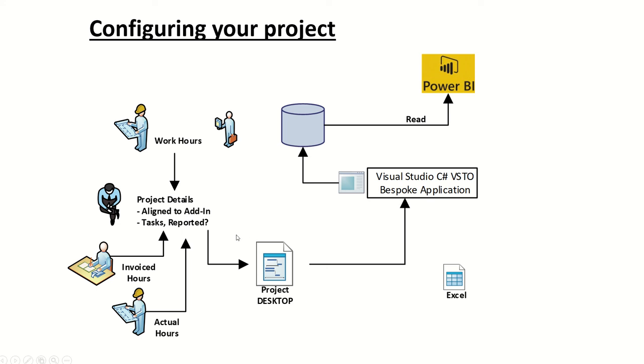You know, you get different versions: Microsoft Project Online, which is basically SharePoint hosted on Azure, which I've used, and Project Server, which is then hosted usually on a virtual server, and then you get a database. So Project Online comes with services, and that's how you acquire the data. Project Server comes with a backend database, and you can query anything on the database because you own the database. That's really aimed at the enterprises.